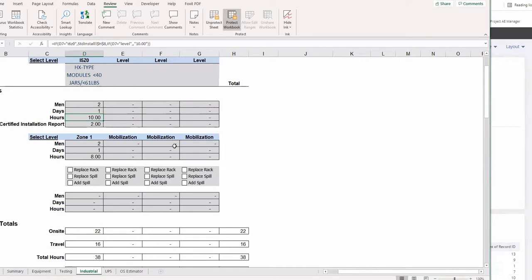There's a lot of different things that's not worth going over in this particular video, but there are a lot of different scenarios that you have to account for labor-wise when you're doing a telecom. Even with the same DC system install, there's a lot of nuances that are required that are different for those two type customers. Day rate being 8 hours, we have built in 2 hours for zone 0. We have built in 2 hours for things such as, let's say it takes us 30 minutes to get there and 30 minutes to get back. There's 1 hour we charge for.